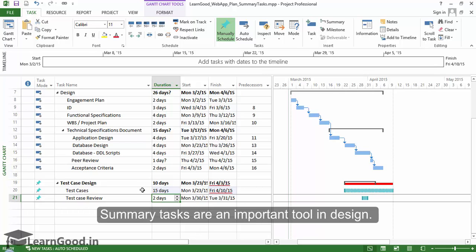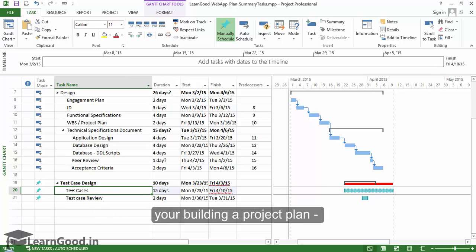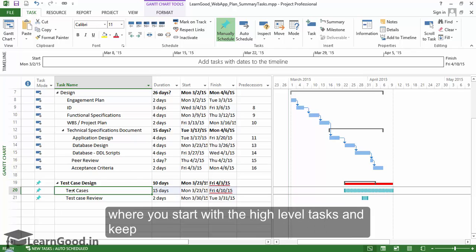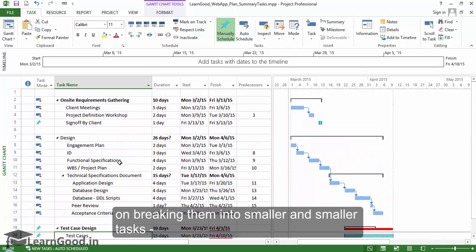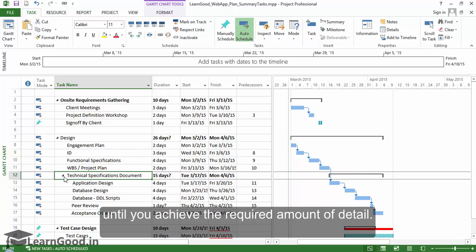Summary tasks are an important tool in design. They allow a top-down planning approach on your project plan where you start with the high level tasks and keep on breaking them into smaller and smaller tasks until you achieve the required amount of detail.